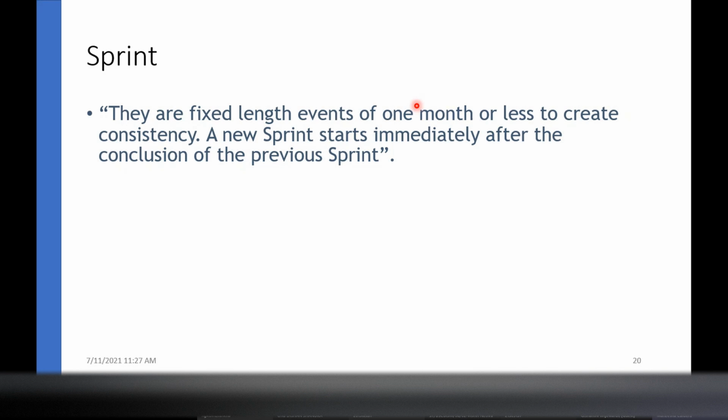Usually it's 2 to 3 weeks. Sometimes they say 2 to 4 weeks, but what I have realized is 2 to 3 weeks is the industrial usage. Within these 3 weeks you should be able to complete these tasks or these events.